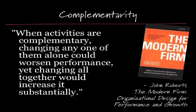So if you decide we're going to still do big requirements documents and then technical specifications and have that process of spending months investing in bolting down what you're going to build before you actually start building it. And then you get into the development phase and you decide, well, we're going to iterate and we're going to adapt and change stories as we go through. You're potentially throwing away effort that you invested earlier, and maybe even having to spend extra effort in order to sync up. If you want to keep those original documents accurate, you've got to go back and make changes in multiple places. And so you can actually come out worse than if you take things in a piecemeal fashion.